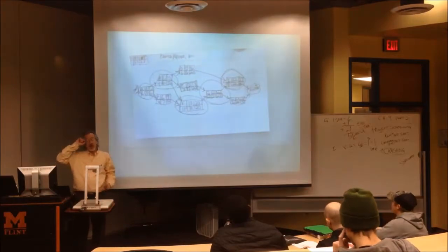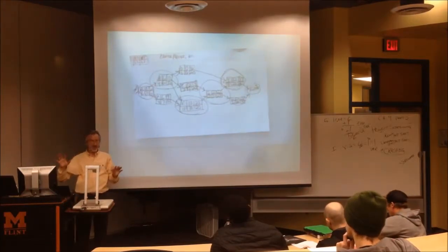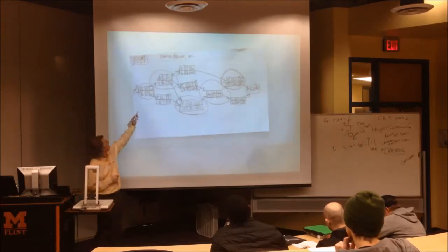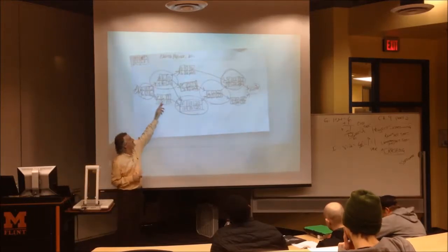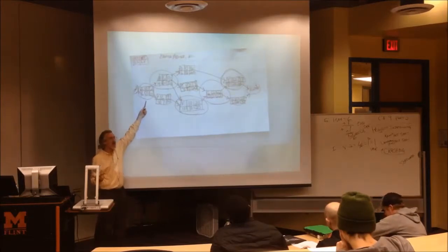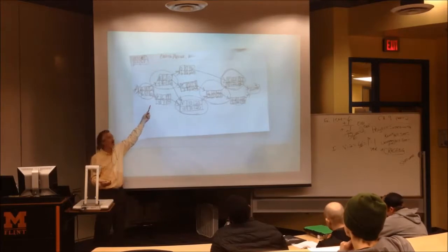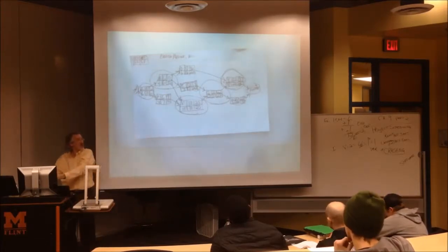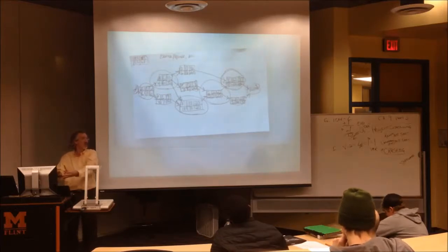Now, I want to give you a heads up, because I've seen this happen a lot of times. There's students that think it will be a shortcut if they find the standard deviation of each of these activities. So they say, oh, I'm going to find the variance of A anyway, I might as well square root it and just turn it into a standard deviation. And they'll do that for each one, then add them together and go, look, I got the project standard deviation instead of just the variance.